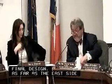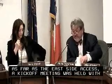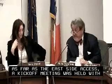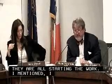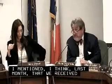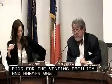As far as the East Side Access, a kickoff meeting was held with the 44th Street demolition, construction of the fan plant structure and 245 Park Avenue, as well as Queens Bored Tunnel contractors. So they all are starting the work. I mentioned, I think last month, that we received 9 bids for the 50th Street vent facility, and Halmar was the low bidder, and it was below the engineer's estimate quite significantly. And again, that's a good thing. It's a good trend.